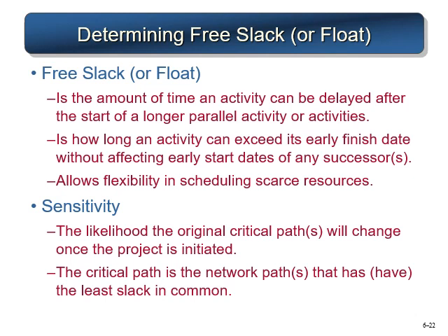So you have an early start of 5 and a late start of 7. That means that activity has got a slack of 2 days. So if we have an early start of 5 and late start of 7, that means that activity can be delayed by 2 days, and that's the free slack.